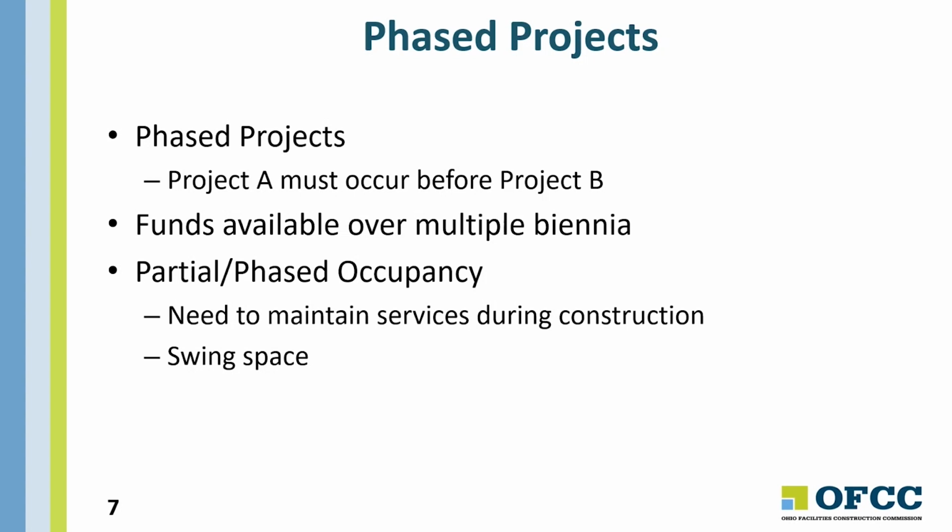Also might include partial or phased occupancy. And there's a need oftentimes to maintain services during construction of that subsequent phase. Sometimes there might be a need to swing the program that's housed by that facility into another space for a period of time. And you always need to consider moving costs if you're swinging out and swinging back in or going from one building to another.